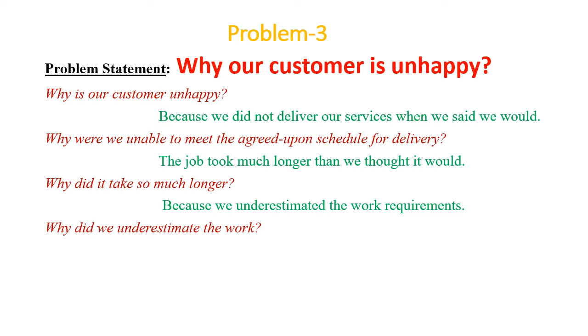But why did we underestimate the work? Because we did not do proper planning for this job. We did not check how much job is there, what is the volume of the job, and how the job will be executed, what resources are required, whether we have all the resources available in our facility, or we need to hire some external agency, or we need to procure some new things to meet it. So this type of thing happens.